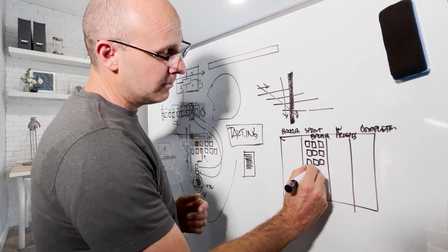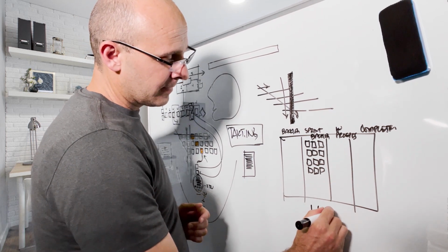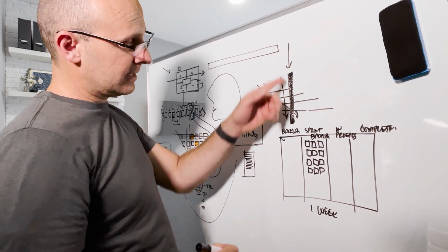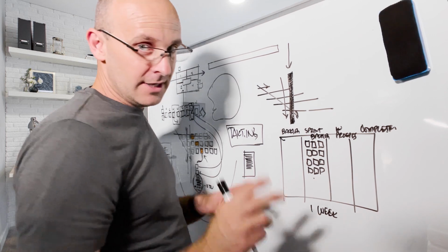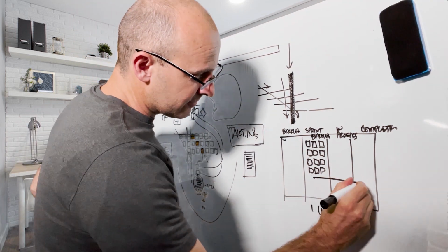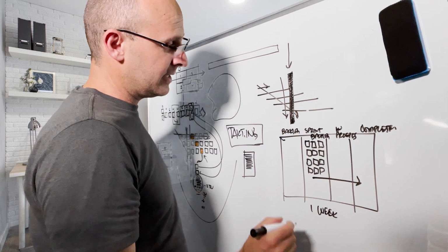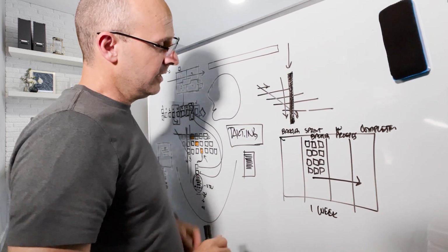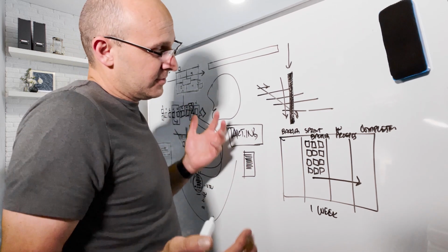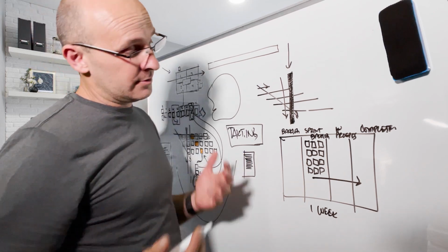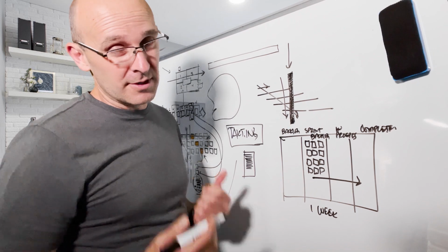whatever you want to do, but then that week, in that sprint, this would be 1 week, you know what items inside the Takt plan for that week have to get done. And you work in a collaborative team in your Scrum team to move these from left to right, from your sprint backlog to in progress to complete. And then you have a week's worth of work to get through. And it's a beautiful system. So when I say Takt supporting Last Planner and Scrum, maybe we didn't do the best job of explaining it in the book, but we will this time.